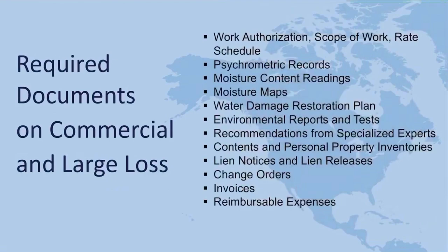When you place a lien on a property, a lot of times, or most of the time, it will violate the mortgage on the property, which means the mortgage holder could foreclose on the property. In most all instances, having a lien placed on a property, if you're renting it, will violate the lease agreement that you have, which could cause somebody to lose their lease. That will come with extremely high liabilities for you if it's done incorrectly.